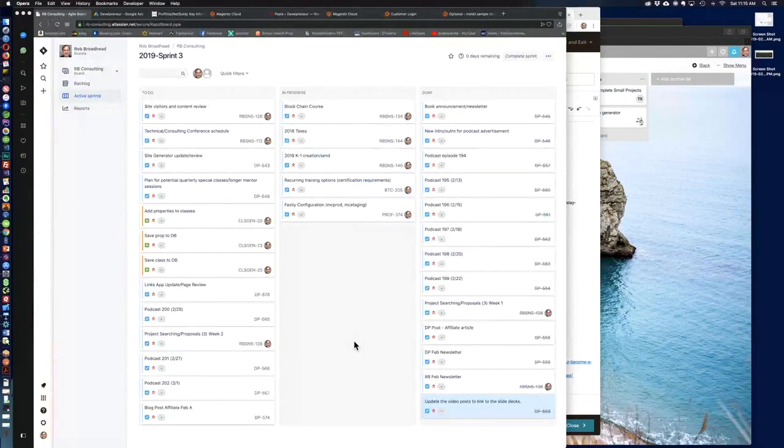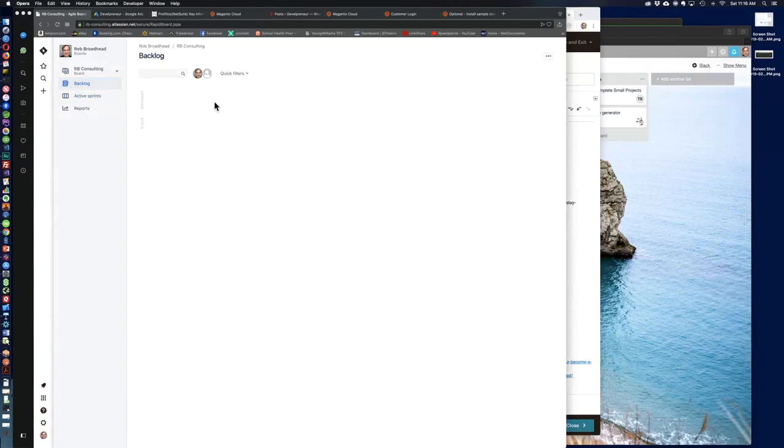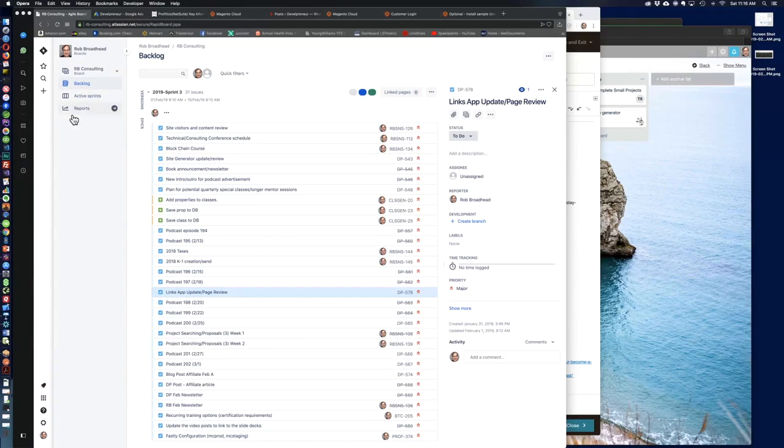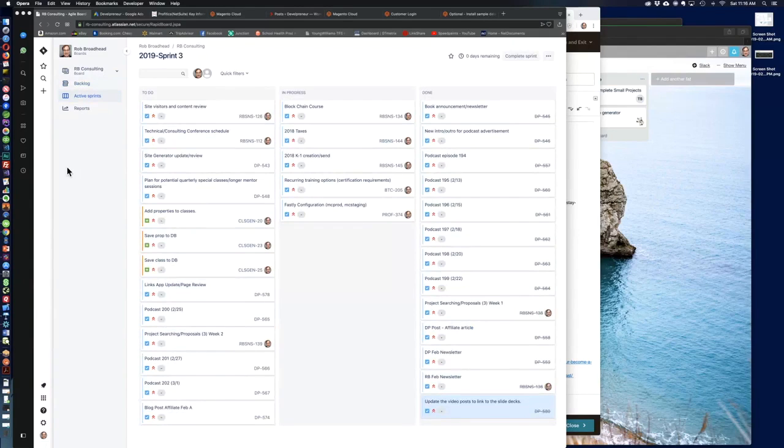Some of these even have an RSS feed you can tap into or something of that sort. For example, I use Jira and have used it for years and years now. The last couple of years, what I do is every 2 weeks, twice a month, I do a sprint. I do 2-week sprints, to the 15th and to the end of the month, every month, 24 sprints a year. And with that, I've got a backlog of stuff I'm going to do, and I'm regularly creating tickets for that. It doesn't take a whole lot of time. I probably spend about 15 minutes per sprint creating tickets, and closing the prior one out and opening the new one.